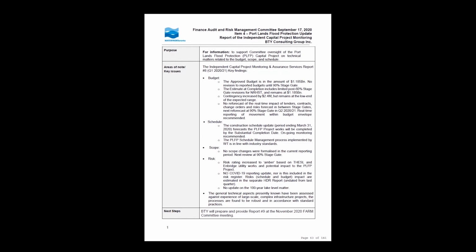Pat, in answer to your question, we do continue to require permits. We get release for construction permits for really every part of the project that we're doing, and we're doing it on a just-in-time basis, where the city is releasing. We provide the packages to the city, they review them, and then they release the construction to happen as we need it. So for work that is ongoing we've got the permits, but for work where designs remain to be finalized, or the work isn't scheduled to start yet, those permits are yet to come.